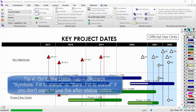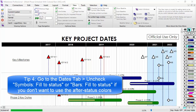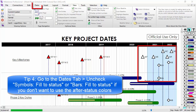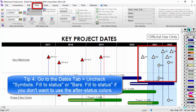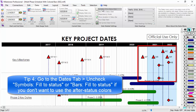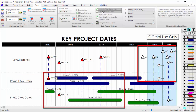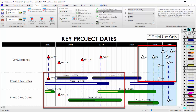Tip number four: if some of your symbols or bars are hollow looking or being filled as white instead of the normal color, you might need to change your status settings. Go to the Dates tab and check or uncheck 'Symbols Fill the Status Date' and 'Bars Fill the Status Date'. You can see the difference on the schedule as I check or uncheck these checkboxes.